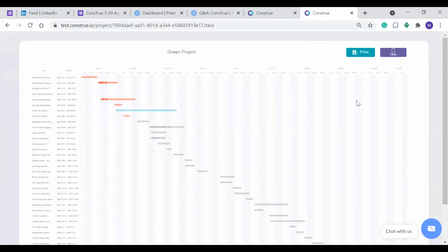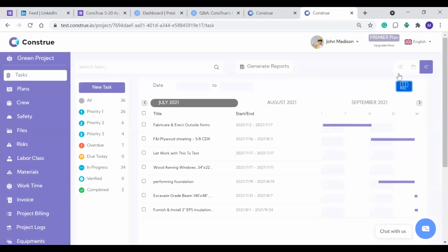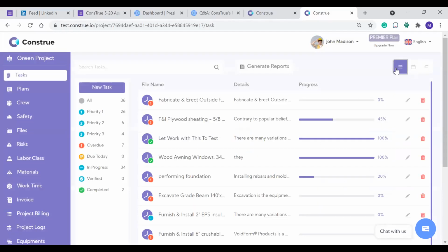We didn't go over it today, but hopefully next week we're going to go over a little bit about it. Does that integrate back with the time that you tell the operations and field side that they have for each task? Correct, yes, that's exactly what is being imported from that. So when they mark that they started demolition, or whatever you pulled up there a second ago, it would tie back to the schedule and say yes, they started at a certain time, and then track their completion also with what they report.